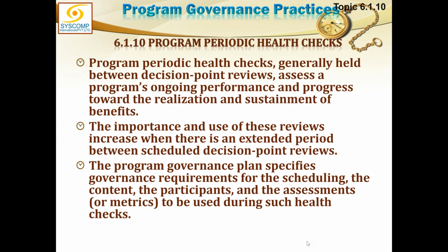The importance and use of these reviews, the health checks, increase when there is an extended period between scheduled decision point reviews. Say there is one decision point and the other decision point, both are a year apart. So don't we need to see in between how the program is performing?